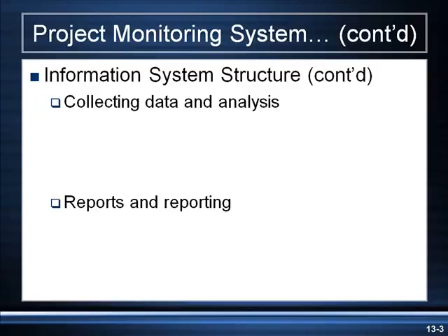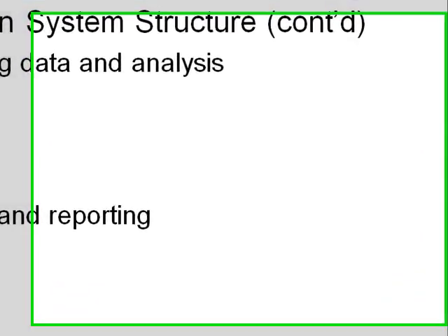The third question is, when will it be collected, and who will compile and analyze the data? Compile means put it together. Who will put the data together and who will analyze it? Is that going to be a central area, or is a separate department going to take care of cost and a separate department take care of schedule?